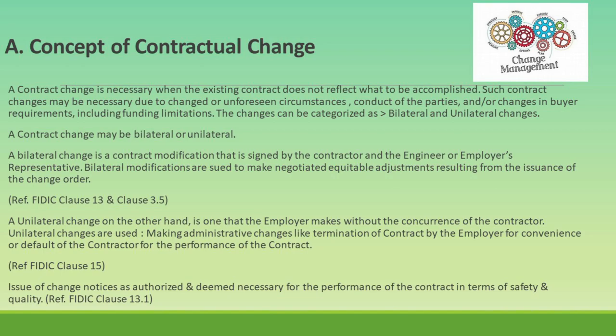Contract changes can be categorized as either bilateral or unilateral. A bilateral change is a contract modification signed by both the contractor and the engineer or employer's representative. These modifications are used to make negotiated equitable adjustments resulting from the change order. This process is covered under FIDIC Clause 13 — Variations and Adjustments — which allows for changes to the work, adjustments to the contract price, and extensions of time. It includes procedures for the engineer to issue instructions, for the contractor to propose variations, and for valuing variations.